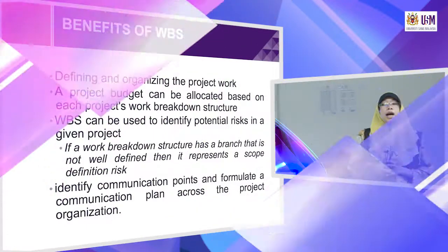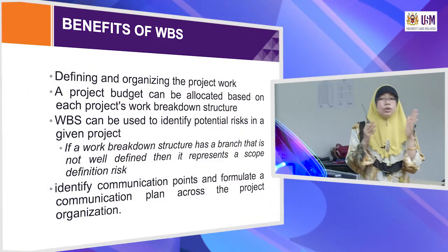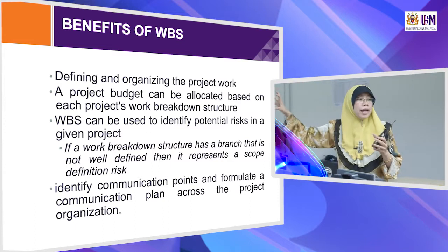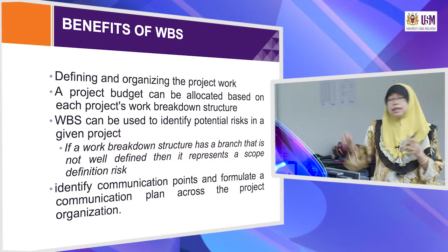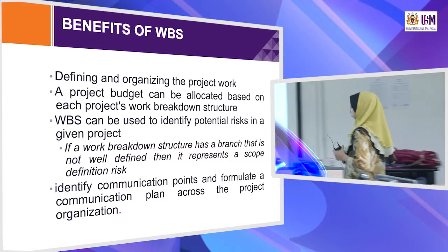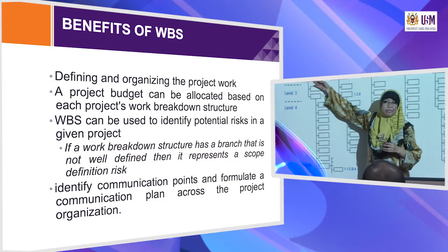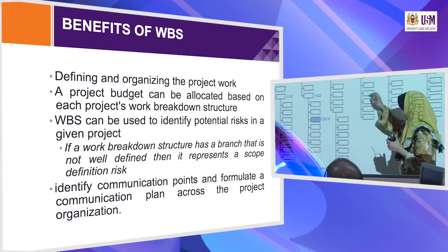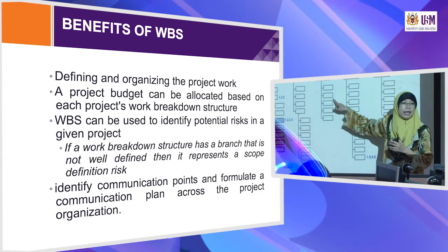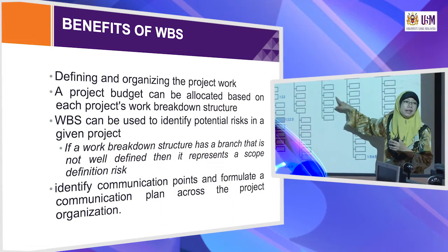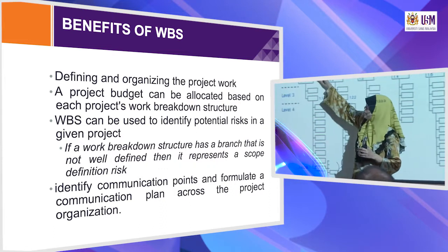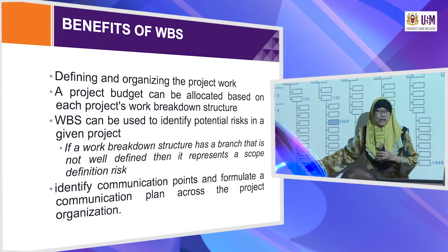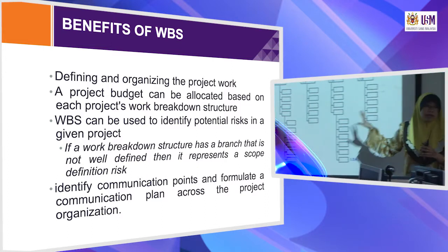Work packages are unique and should not be duplicated across the work breakdown structure. So if you are organizing the food, there's no other food part in other packages. Meaning that if you have food here, for example, there shouldn't be food elsewhere. Drinking, for example, tea break, all about the food will be here only. No duplicate in other packages.